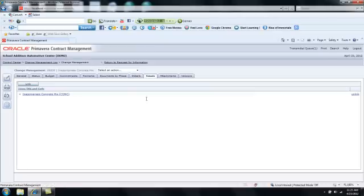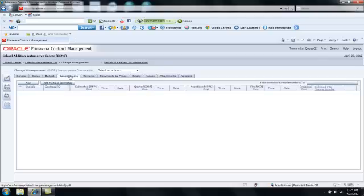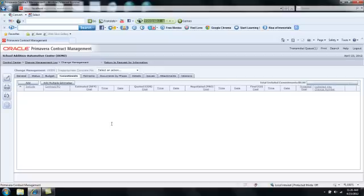If I go to Issues, I will see that that very same issue carried forward to the change management document. So what I'm going to do is start on the Commitments tab, and my first step is to identify the other project participants that may be involved in this change and ask them to submit a quote for their scope of work.